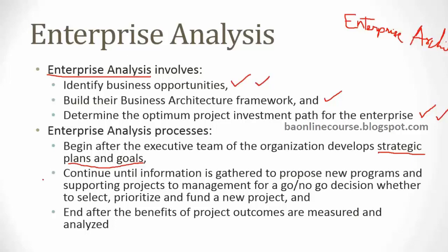So you will consolidate all of that and then take it to the senior management as a business case document with a go no go decision. So the senior management would look at your argument, they would look at the business case document, and finally approve or reject the project. Right? If it is approved, then your project planning would start, and then you would move on to the next steps.